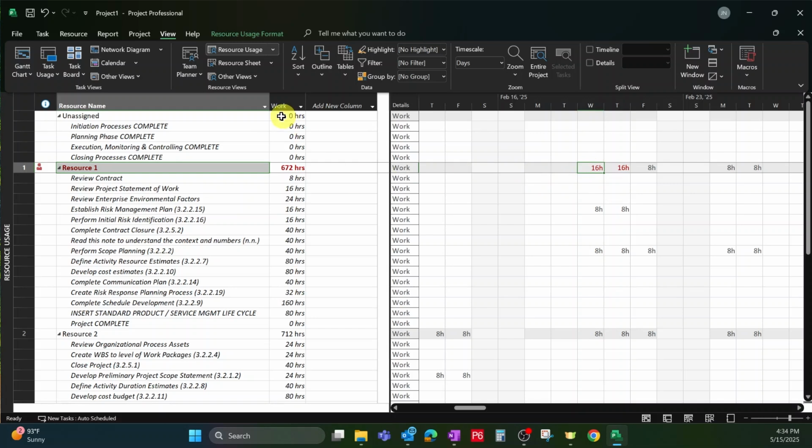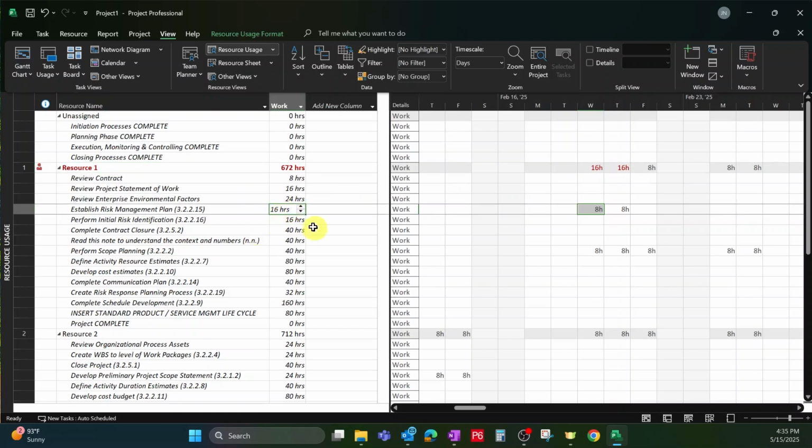And then work, you can hover over and define it. It's basically man hours is what this is saying. It's saying however many individuals on that project or on that task times the duration. So that's where 8 comes from, because we don't have on this schedule how many individuals are working on that task. It just represents 1 and then 8 hours. That's an 8-hour day. Or for this one it is 16. So it's 16 because of the calendar around that. So it's 2 8-hour days.